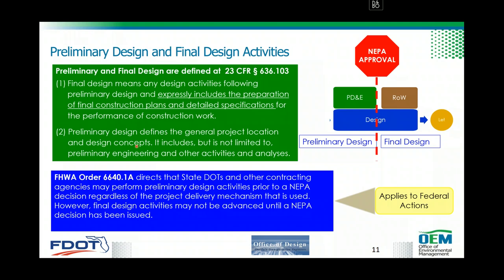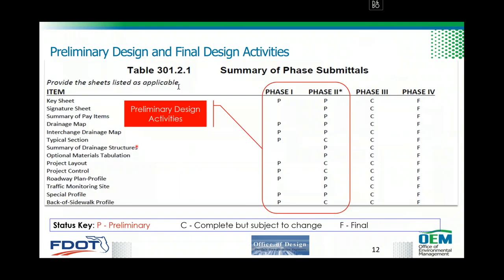So emphasizing that you can combine design activities and NEPA, which is PD&E, but at the same time, you have to make sure that you're not continuing to prepare final design activities until PD&E is approved.